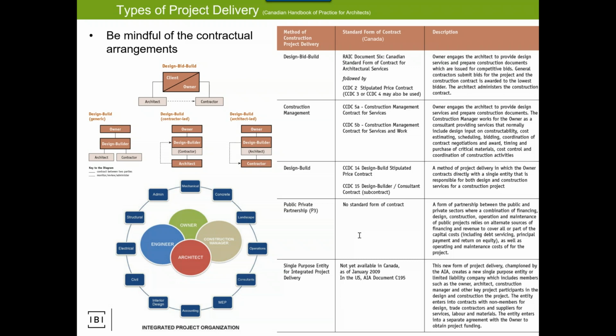So the whole shop drawing review process is very interesting. Often the engineers and architects will stamp the shop drawings stating that it conforms with the design, and the shop drawing is being professionally sealed, usually by the fabricator. Where that wouldn't be true is if the specification didn't require it to be stamped by the fabricator. But for structural steel, 100%, the spec will say all shop drawings are stamped by the fabricator, and then the design engineer reviews it for conformance.